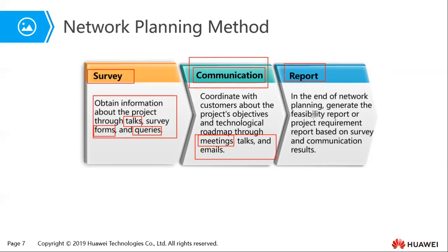We need to summarize all the first-hand materials and all the consensus that we've had during the survey, and any communications that we've had through meetings, talks, emails, etc. Now, once you do that, you need to share this report with the customer and the members of this particular project team.